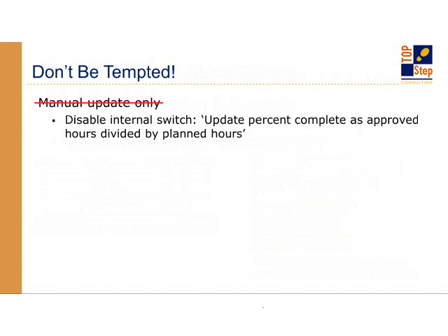It is too much work for any human to maintain accurate percent complete. It's part of the reason that you bought OpenAir in the first place, so that you can have the system do that work for you. What about, okay, let's say I'll let the system calculate it, but let me add a separate field that the project manager can update where he's going to give his 2 cents and say, well, I know the system is calculating 50% complete, but actually it's more like 80. Project manager knows better. If you want to do both, the problem is you'd never really know which one to trust. And that information on the custom field doesn't become all that useful.